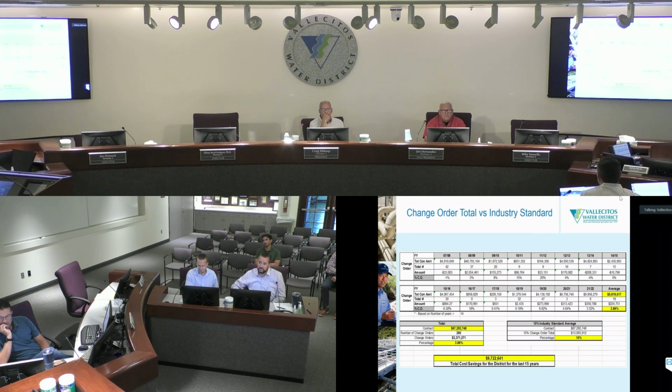Looking back 10 years, or really all the way back to 2007, 2008, keeping tabs on the metrics each year, 2021-22 was more or less on par with what we'd expect. We had a lot of spending, just under $10 million, and our change order totals were 3.52%. On average over the last multiple years, we're averaging a change order percentage rate of about 3.8, and an annual contract spending of roughly $5.8 million.